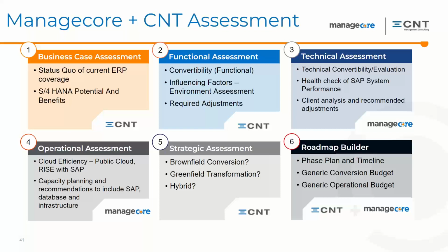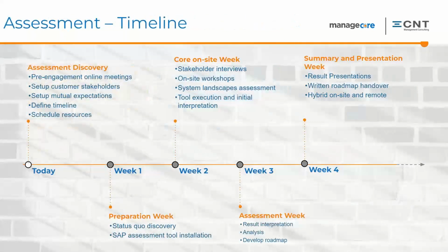In the next slide, we have a bit of an example of what that assessment looks like. It's typically a 4-week assessment if we get all the stakeholders in this time frame. Otherwise, we maybe add 2 more weeks or do a little bit more remote. There's a discovery, there's a preparation week, and then there's a core on-site week where we really talk face-to-face with the stakeholders, both on the operations side and on the business side.